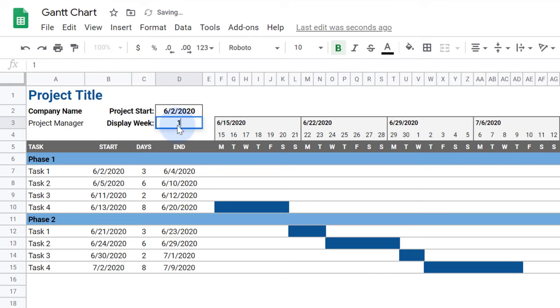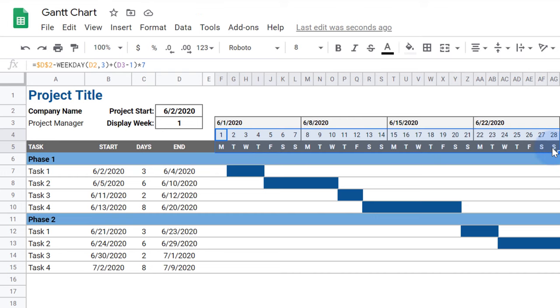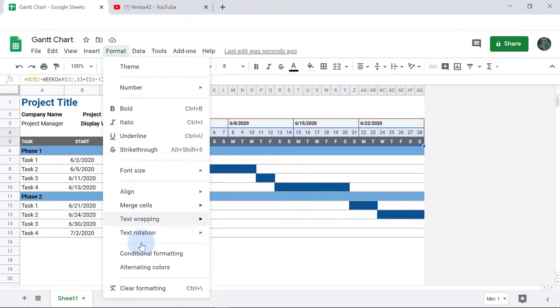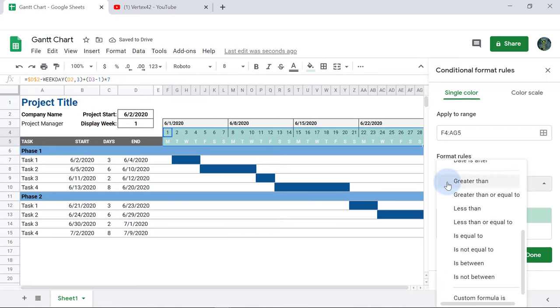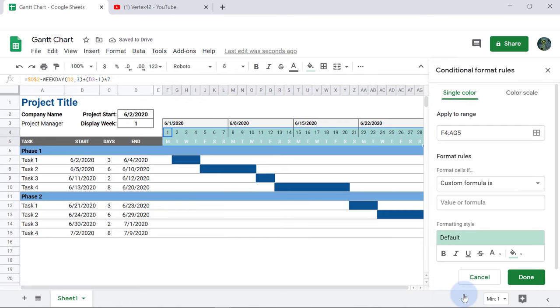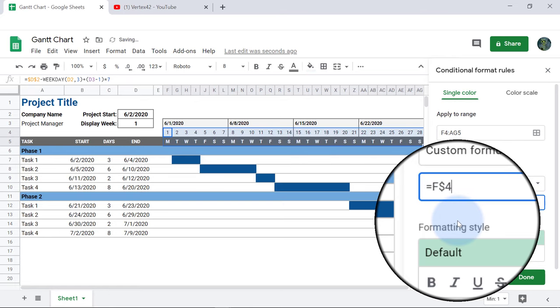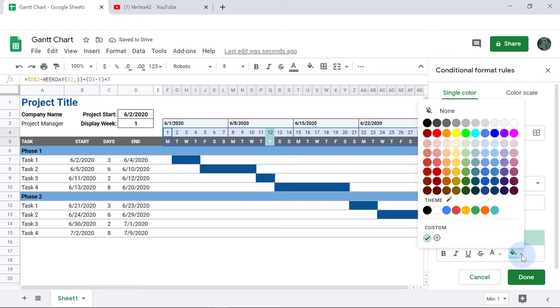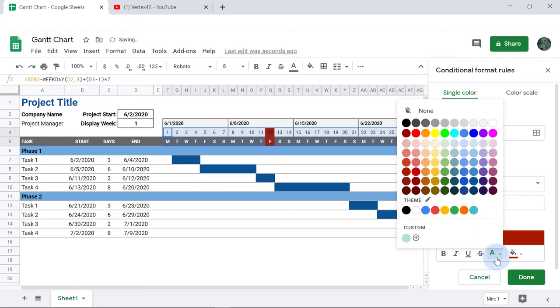Next, I want to highlight the current day in the timeline, which is actually pretty simple. I'll select the rows in the timeline with the day number and letter, then go to Format, Conditional Formatting, and select Custom Formula Is from the dropdown. The formula will be a comparison of the date at the top of the column to the function TODAY. I'll make the highlight red and the font white and bold.